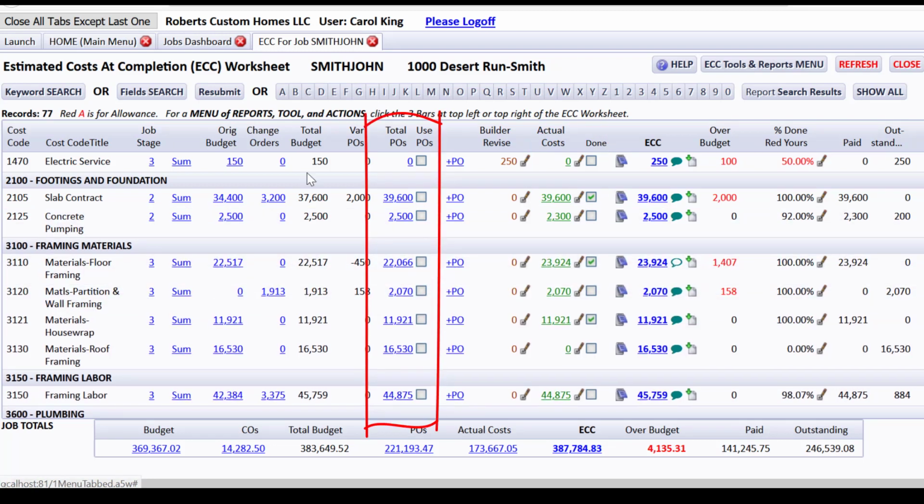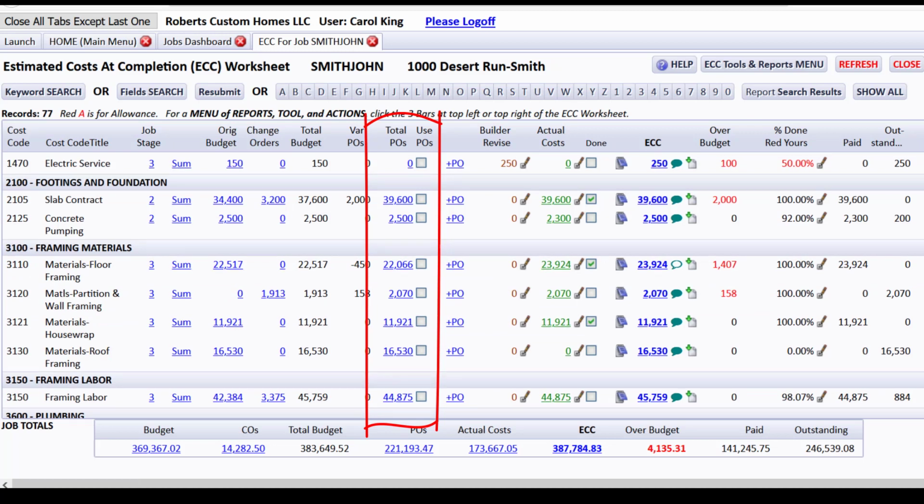Now if you use purchase orders, there probably won't be many errors in cost codes, because if you issue purchase orders and a person gets a bill from, say, whoever this is, ProBuild, when they're entering the bill they can select the purchase order and it'll drop in to help them enter the bill and get all the right cost codes in, because the purchase orders have cost codes.